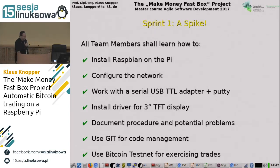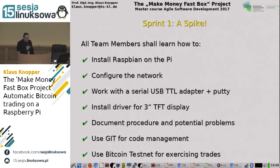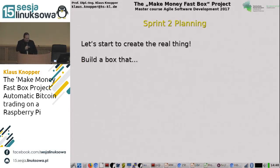Because many of the team had no experience in Linux development, the first sprint was actually a spike — a part of Scrum not directly related to the real project but there to learn the technology to be used. Things like: installing Raspbian on a Pi, configuring the network, working with serial TTL adapter and PuTTY, installing drivers for the TFT display, documenting the procedure and potential problems, and setting up a Git repository for code management. Also, how to use the Bitcoin network for transactions was very important — we set up a connection to the Bitcoin testnet so students could learn how to do Bitcoin transactions with and without fees.